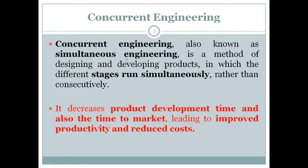Concurrent engineering is also known as simultaneous engineering. It is a method of designing and developing products in which different stages run simultaneously rather than consecutively. The different operations run at the same time. It decreases product development time and time to market, leading to improved productivity and reduced costs. Product development time is reduced, time to market is decreased, productivity increases, and costs are reduced.